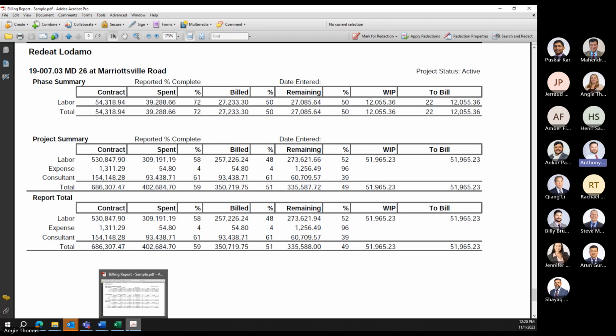If you submitted your 30% plans, you should be roughly around 30% spent on the project, but you could be slightly over or slightly under. The objective is to bill the maximum amount that we can, not repeatedly hold or defer time. So yes, you should be looking at the percent completion.